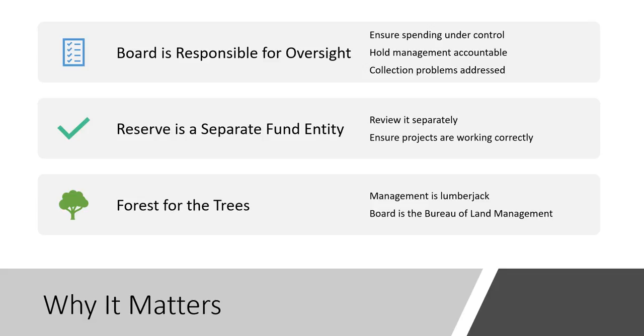Reserves are a separate fund entity. So again, you'll notice I separated them out in this. Deal with the operational issue, then deal with the reserves. So you want to review it separately, and management should report it separately. It's a separate fund. Commingling is dangerous because it can mislead you into thinking that things are probably going well when they're not. Everything should have a budget. So every reserve project dealing with a component should have a budget. So you want to always be comparing where we're at in relationship to where we thought we'd be.